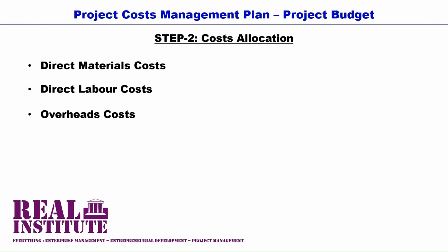A project manager can choose to allocate the project costs at project activity level and then simply add them up into the total project budget. However, it is prudent, especially in large and complex projects, to demonstrate project costing per phase or per milestone for monitoring and controlling purposes, and also for presentation to the project owner, the project sponsor, the project steering committee, the project governance forum, or any other relevant project stakeholder.